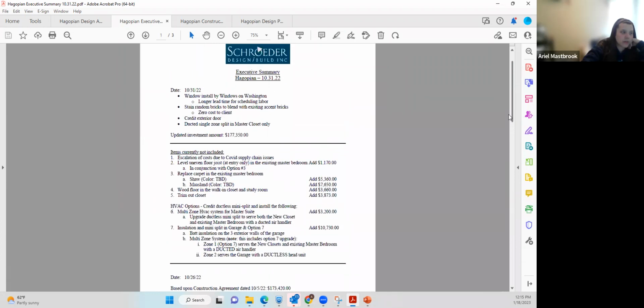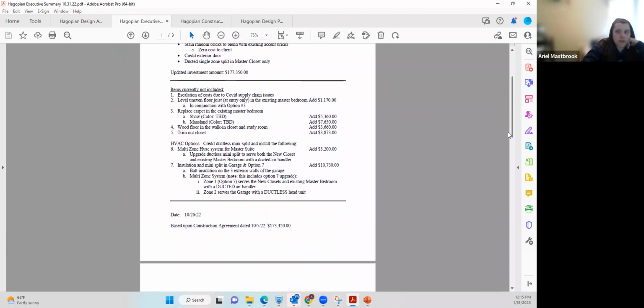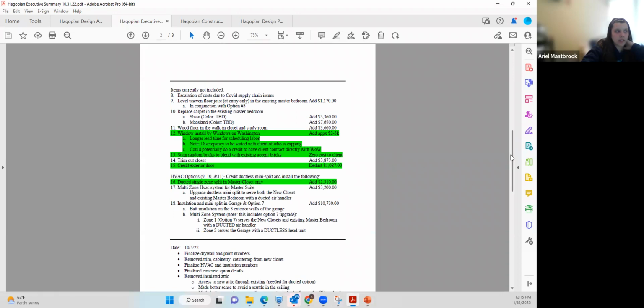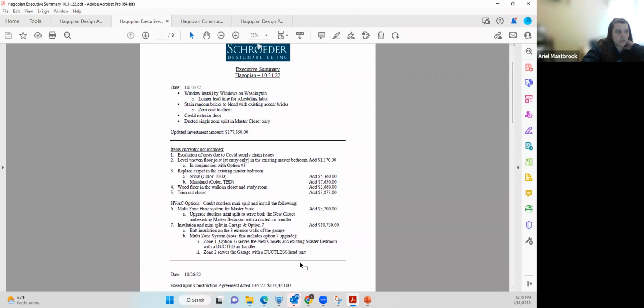After that first executive summary meeting, the PD kind of takes over. So Andrew told, this is Andrew's way of telling me that they want to add in these 3 things. At this point, I don't necessarily need Denny. I don't need to bother Denny. I can just go and put these in myself on ProS because I've been trained on that. And then I can move it. So I took it out of this section and I moved it up here because now it's included. So it's just reformatting a little bit.